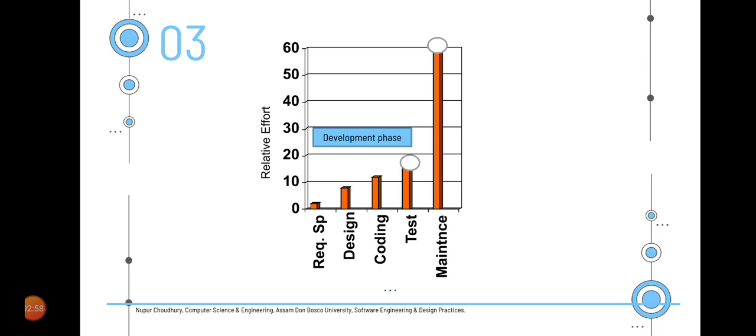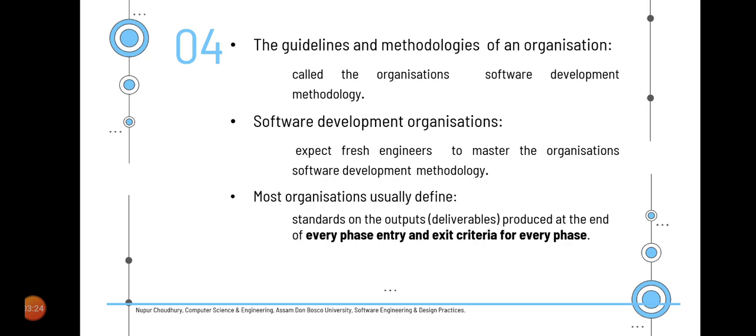The classical waterfall model, or any other model used to document such a process, must not only have the diagrammatic representation but also have a definite entry and exit criteria. As discussed in the previous session, the entry and exit criteria associated with each phase will help us not only to complete each phase successfully but also to prevent the 99% complete syndrome problem.